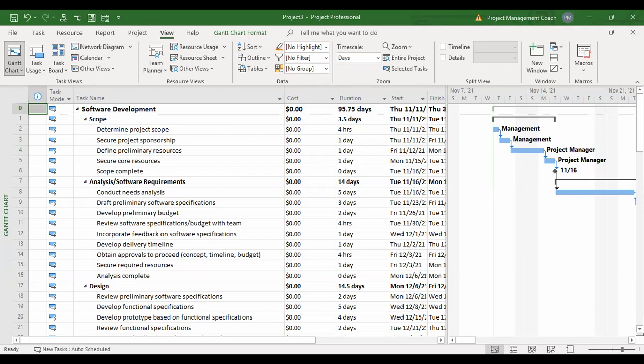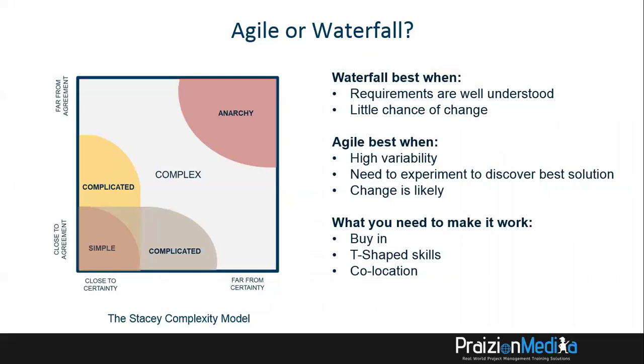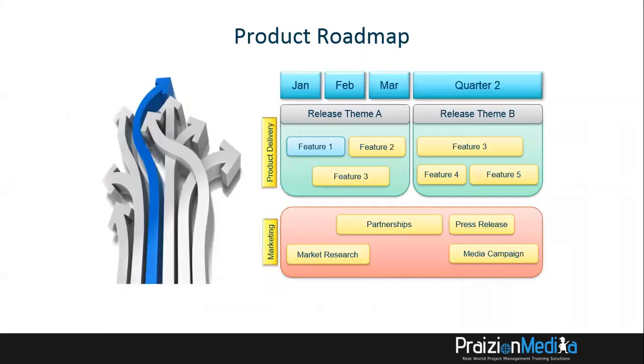what you would do. So in the world of Agile, as opposed to having excruciatingly detailed schedule and cost estimates, we first of all have a high-level idea, a product roadmap. My advice would be to break down the complexity by planning releases, and break down that complexity of whatever you're doing by breaking the release into features. And in other words, plan when each feature set will be released. That is going to help you to plan your sprints and help you know what your end goal from each sprint is going to be.